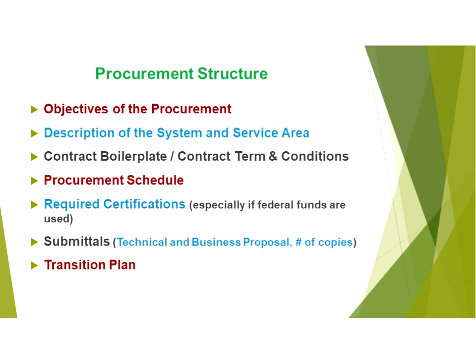And let me just swing through them real quick, because I know I can't write that fast. Here's the project officer, the payment terms, the contract term, length of the contract, DBE requirements, provision for subcontractors, whether you have a living wage rule, your limits of liability for insurance, HIPAA, who owns the data, personnel background checks, replacement of key personnel and subcontractors, indemnification, audit standards, dispute resolution, and termination for cause. A pre-proposal conference should be required. Doesn't have to be.